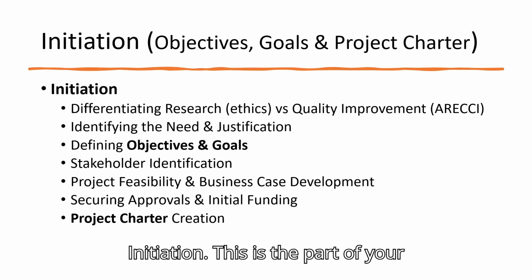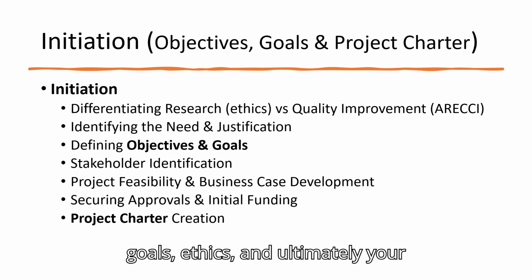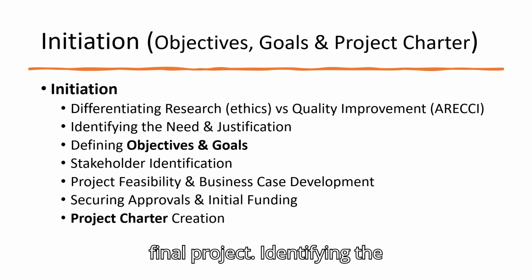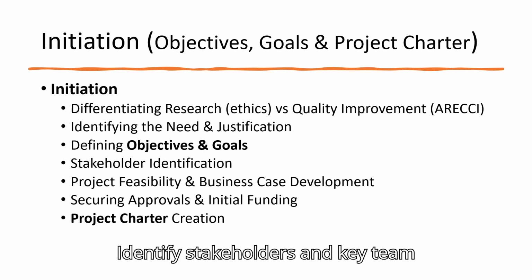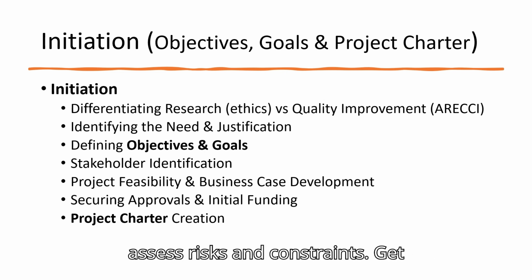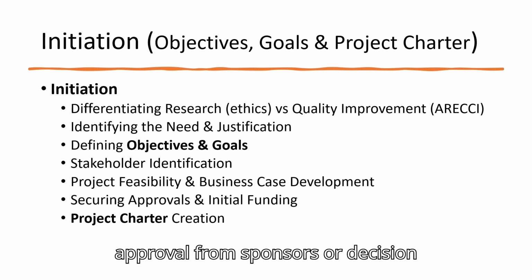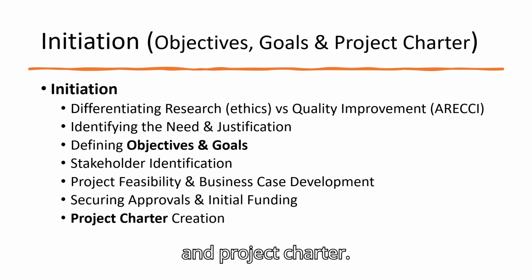Initiation. This is the part of your course that relates to your objectives, goals, ethics, and ultimately your final project. Identifying the need. Define the project goal, objectives, scope, and purpose. Identify stakeholders and key team members. Conduct a feasibility study to assess risks and constraints. Get approval from sponsors or decision makers, and develop a business case and project charter.